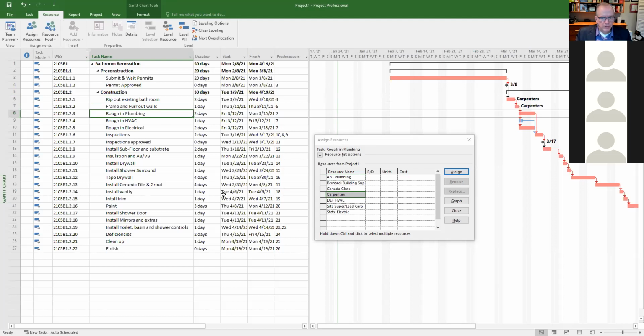Okay. So now I'm going to go to rough-in plumbing, and I'm going to put a cost. What am I going to pay the plumber? What have I told the plumber I'm going to pay them, right? I've said that the ABC Plumbing, they're listed as a cost, $5,000 when they finish the rough-in of the plumbing, right? So I said that they would get paid $5,000 when they finish the rough-in of the plumbing.